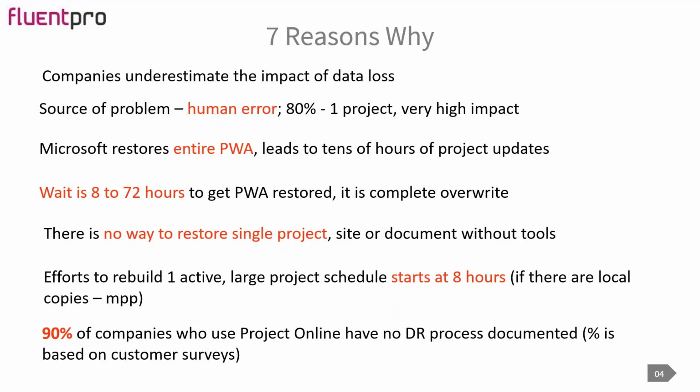In a complex environment where you have multiple dependencies, or a complex project with several project managers, it becomes very critical, and the impact can be very high. Reworking or rebuilding that project can take a significant amount of time. Unfortunately, Microsoft designed Project Online so that you have amazing control over your entire site collection, your PWA, but Microsoft doesn't provide granular protection for single elements, a single document, or a single project. At any point, you can only roll back your entire PWA.